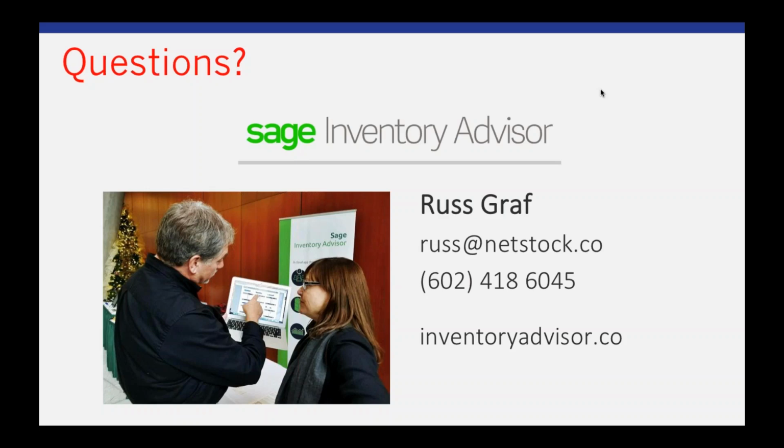The second part of that was deployment time. So I described that 5-step process. I would say that typically we're targeting a 4 to 6 week process to get you up and running. The first couple steps are pretty rapid. We get you installed and you get your first dashboard pretty quickly, within a week or so of signing a contract with us, assuming you're available. So we'll move as quickly as the end user is able to.